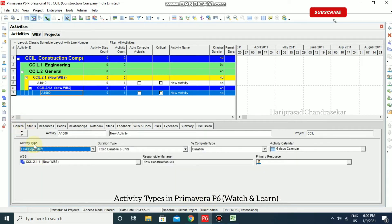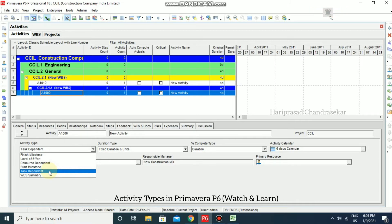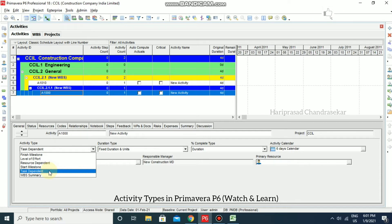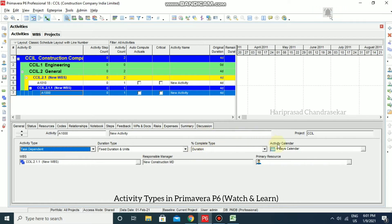The first activity type is Task Dependent, which is typically used when work needs to be accomplished within a given time frame regardless of the assigned resources' availability. Within that time frame, the activity must be completed. The activity's resources are scheduled to work according to the activity calendar, and the duration is determined by the assigned calendar's work week.